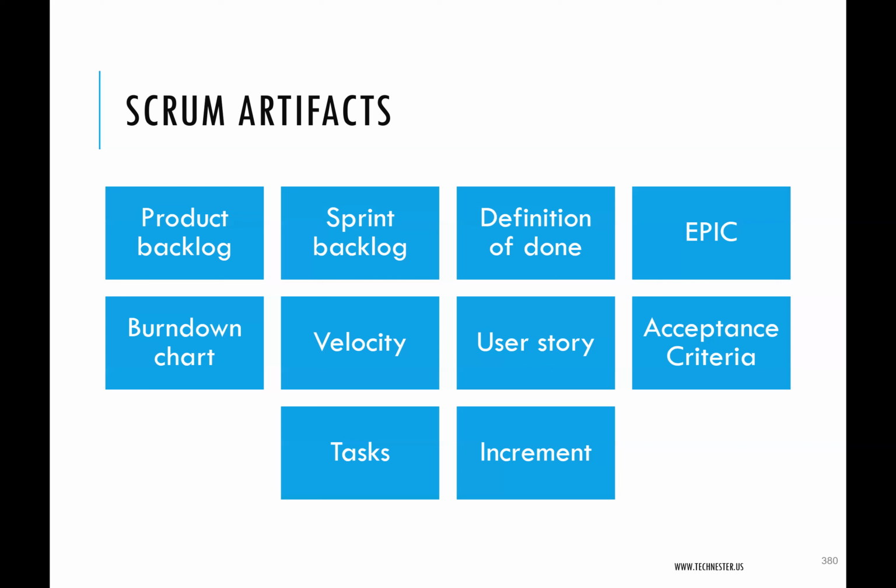If it's starting from, let's say you have a chart like this, where this is the amount of work we need to get started. As you have sprints here, sprint 1, sprint 2, sprint 3, sprint 4. As the sprints go on, the chart is supposed to be coming down because the amount of work will be reducing. So here you have amount of work, and here you have the sprint.